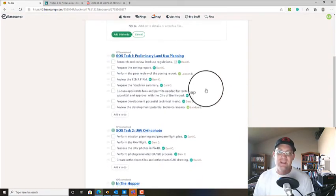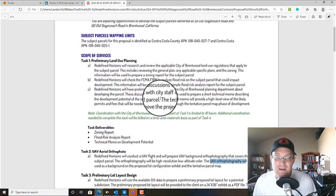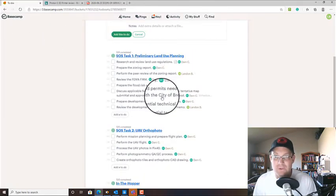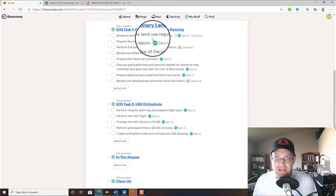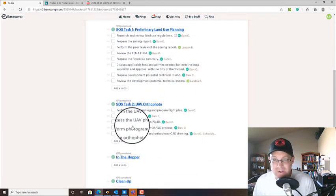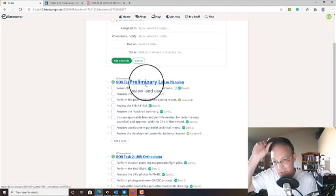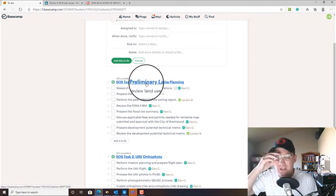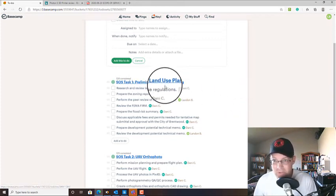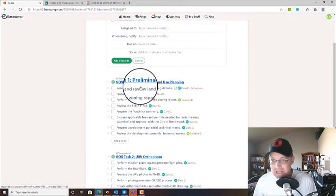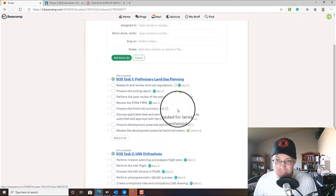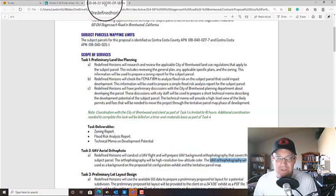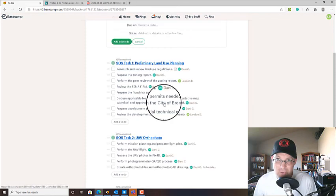What I primarily wanted to show you guys in this video was how you can take a scope of services that looks like this, use the information in the scope of services and any workflows that your company has, and then you can actually come in here and spell out the tasks that need to be done to meet that scope of services. And this is really important because your scope of services should govern the work that your team's performing on the project. You want to make sure that you don't do out of scope work without being paid. And you want to make sure that everything that you included in the scope is performed for the client. You don't want to find out the day a deliverable is due that your team forgot to do something.